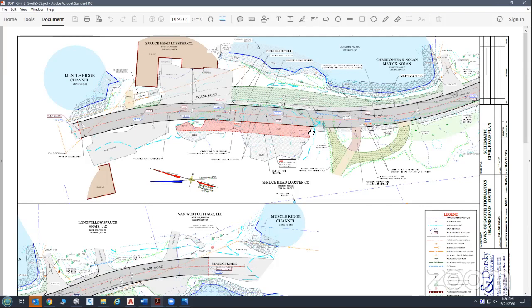They know where the edge of the blasting is going to go, and they basically will drill a number of smaller holes, and there'll be a certain depth. They can reduce the depth. I think the minimum they can do is something in the 4-foot range, but that way they can keep that shallow, they can keep the holes closer together, and then they can use a much smaller charge so it won't shake the house foundations and damage any wells in that area, so they can control it.